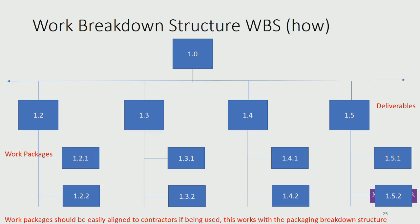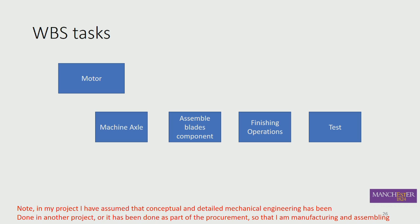So what you do is you break down your product breakdown structure to the lowest level, and then you think, okay, we've got the what. Now, how are we going to deliver this detailed list of deliverables? So we get this work breakdown structure, with similar logic: the top level, the second level, and then the indent, where we've got an extra decimal point. Every time you add another decimal point, you're going down to another level of detail. This is our logical view of a work breakdown structure.